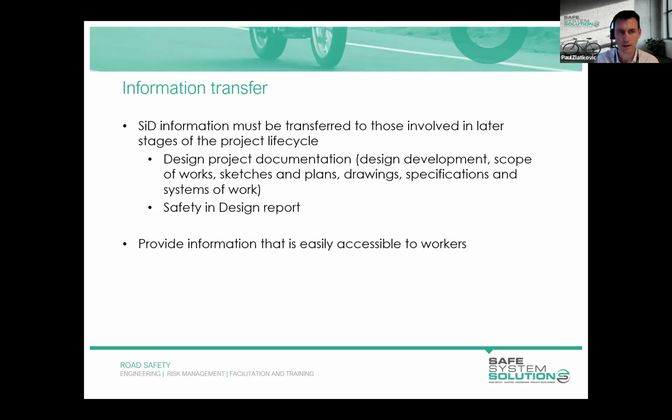You still need to do the report, but taking out the key risk from that report and maybe putting it on a drawing that's more easily accessible, putting it on a notice board in a grid hut where there are workers, could be a way that you can achieve that. So just be mindful that you've done all the work, you've put the thought in, make sure it gets to the people that will need it.